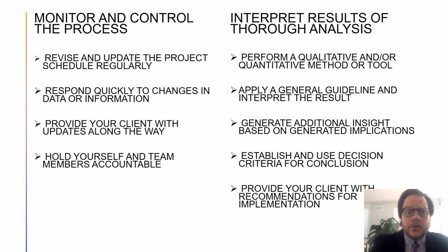Now, when you're interpreting the results of your thorough analysis, so you're going to perform a qualitative or quantitative method or tool, you want to make sure that you're applying a general guideline and interpreting the result. Again, as an example, a general guideline would be that if the net present value of a project is positive, then that project should be pursued.